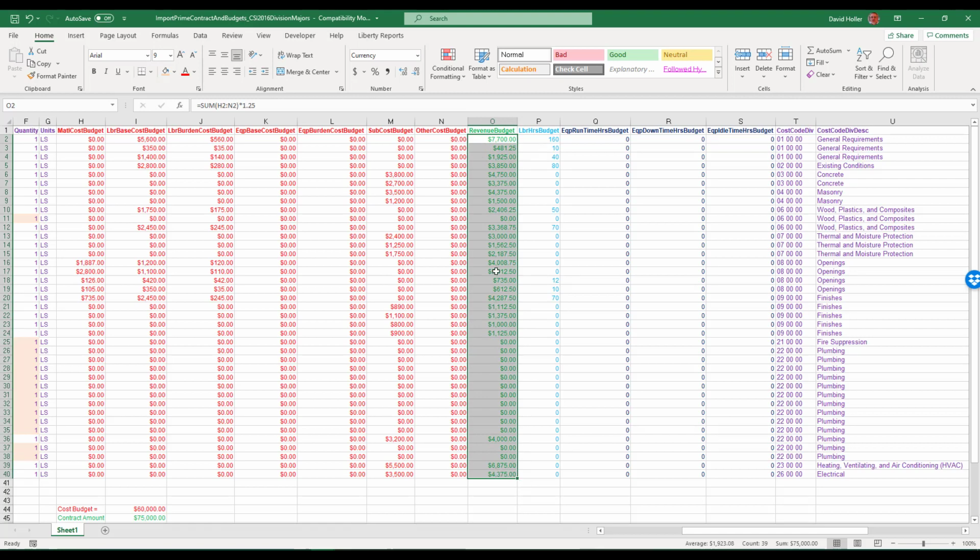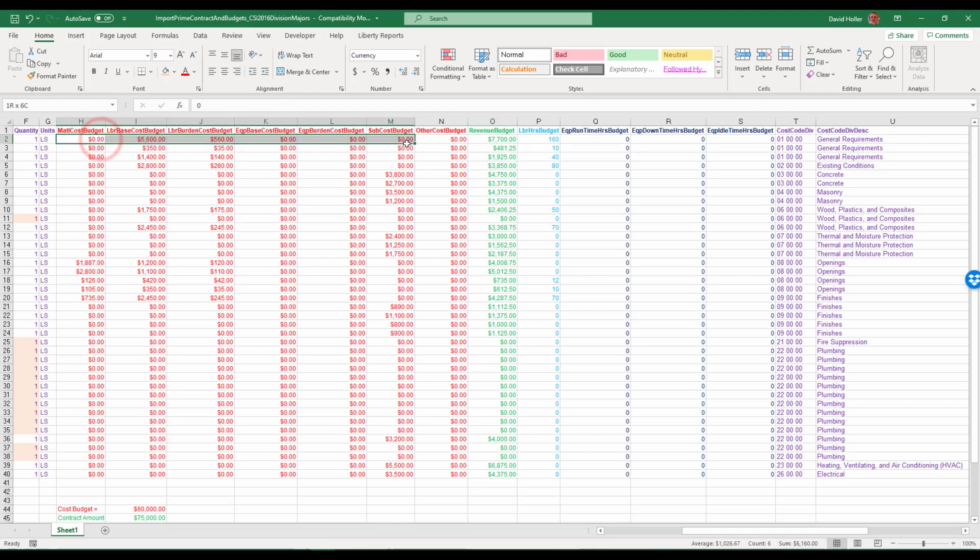The schedule of values for each line item has the markup, the fee, the overhead, and profit built in. I did use a formula, and when I import this, Corecon is only going to import the value, not the formula. But you'll notice that the cost on any one line item is less than the revenue, and the goal there is to make a little profit.